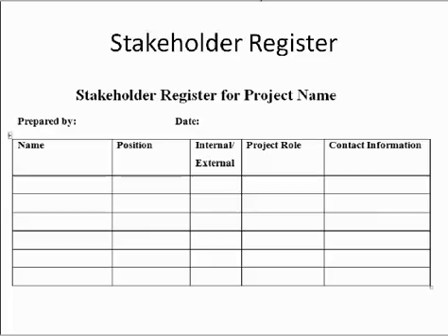These people could include the project sponsor, project team, support staff, functional managers. You will need to identify just the key personnel from these areas and include them in your Stakeholder Register. Stakeholders external to the organization could be customers, suppliers, vendors, or any major contributor to the project. Usually you will have the representatives as a stakeholder. The information should not contain sensitive material, simply organizational information.